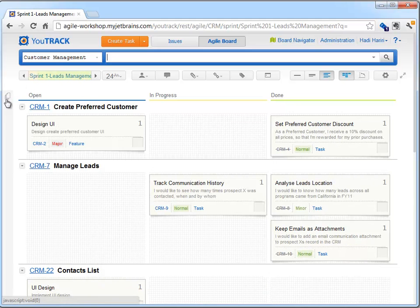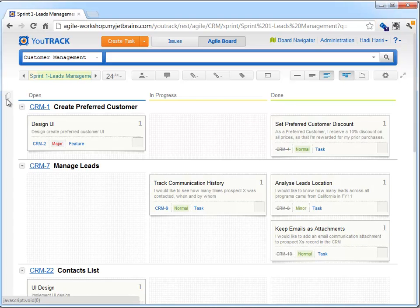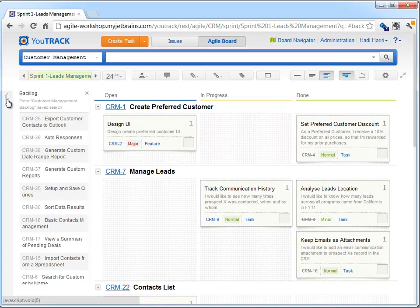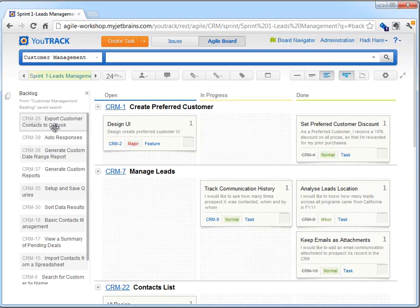As soon as we create a sprint, our backlog is now activated, and we can start dragging and dropping features, or stories, over to our board.